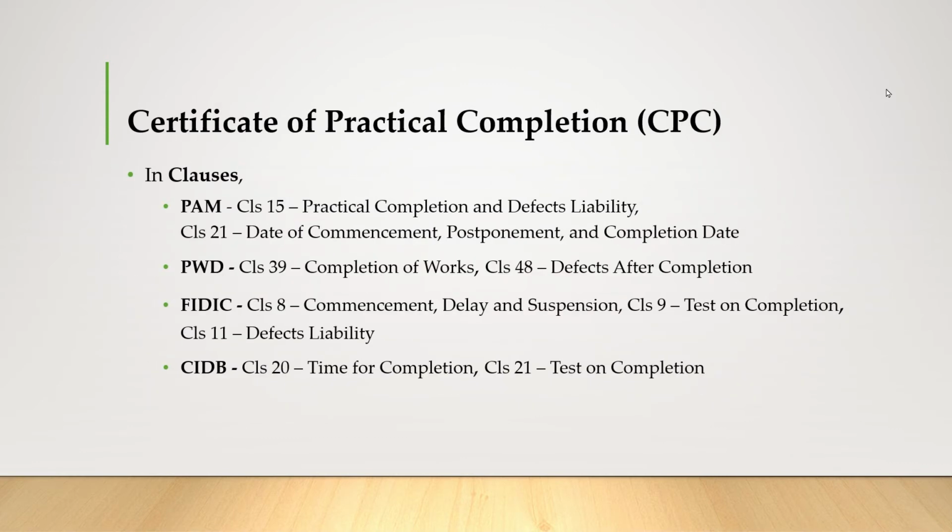So the third one, we will talk about the certificate of practical completion, the CPC. The CPC is stated in PAM under clause 15, practical completion and defects liability, and also clause 21, date of commencement, postponement, and completion. Then in PWD, it is stated under clause 39, completion of work, and also clause 48, defects after completion. And in FIDIC, it is stated under clause 8, commencement, delay and suspension, clause 9, the tests on completion, and also clause 11, defects liabilities.